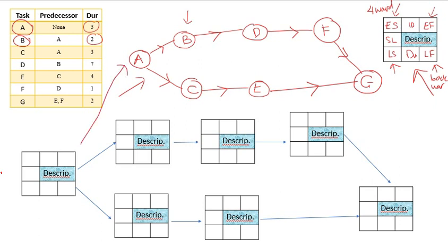So let's start with the first box here. This actually represents this one, the A. So we're going to put all the IDs first in all of these boxes. This is A, and this is B, this is C, D, E, F, and G. And we can fill up the duration. So this is 5, this is 2, C is 3, D is 7, E is 4, F is 1, and G is 2.